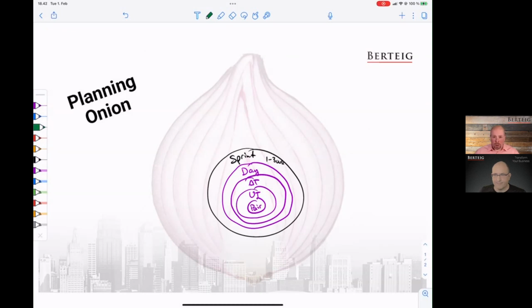Then we talk about, in order for us to hit our goals, the commitment that we made in the sprint planning, what do we need to do today? And then what's blocking us from achieving, or making it difficult for us to achieve, that commitment that we made? So it is a collaborative planning. It's not from one person to a manager or a team lead. It's between everybody within the team.